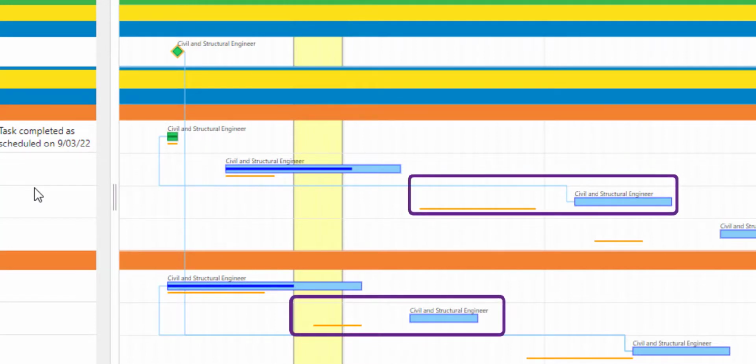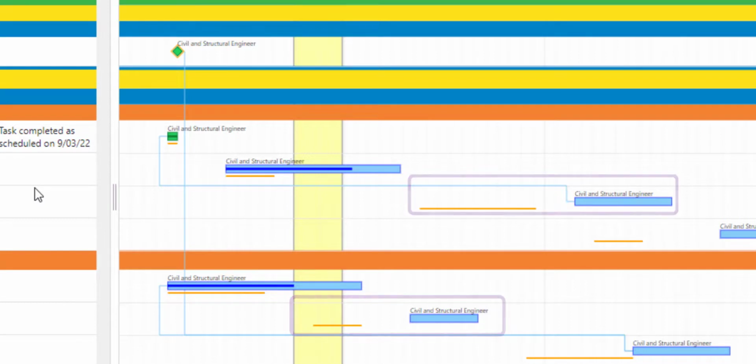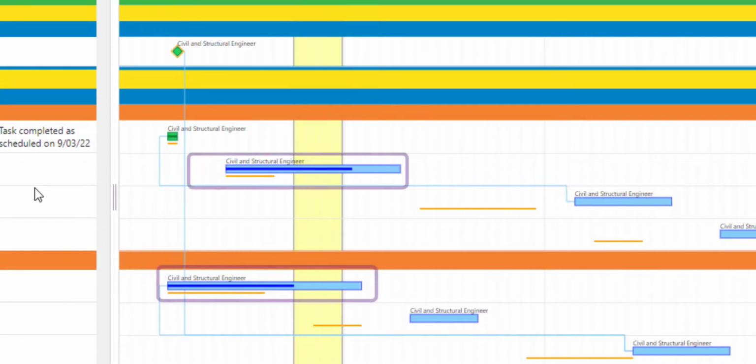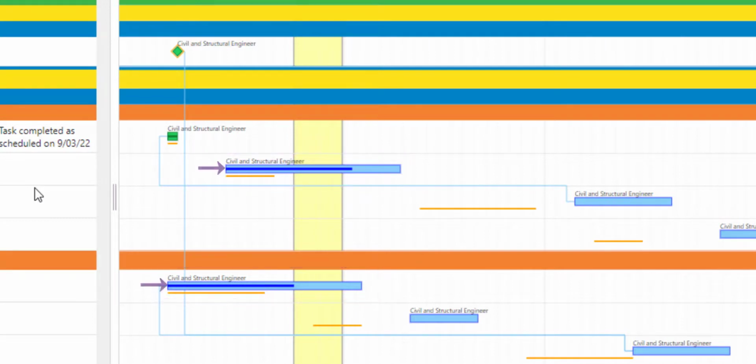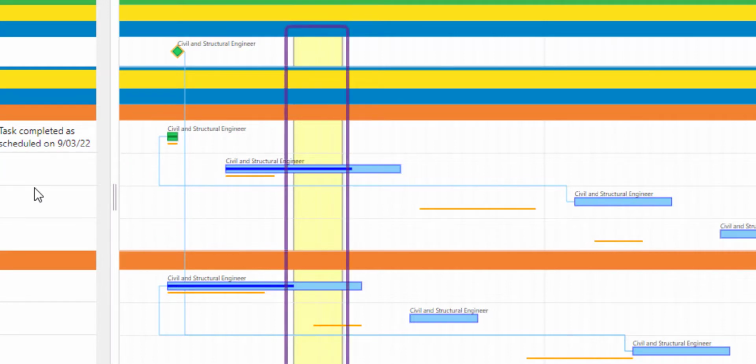Any misalignments could mean that an activity has been delayed, or it is taking longer to complete than what initially was planned. The darker blue lines inside the bars represent how progressed a task is in relation to the reported remaining days and its start date. The lighter blue lines represent dependencies between tasks. The current work plan period will be highlighted in yellow.